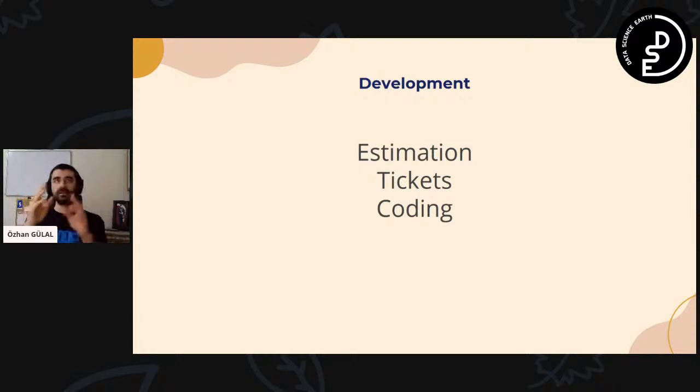I give 5 hours for the display screen and 5 hours for writing the login logic. Totally 10 hours. That was good. And one day shift is 8 hours, with 2 hours transferring to the next day.